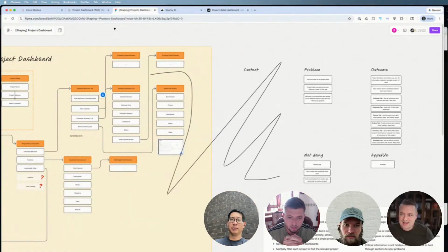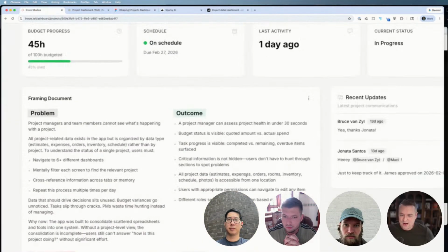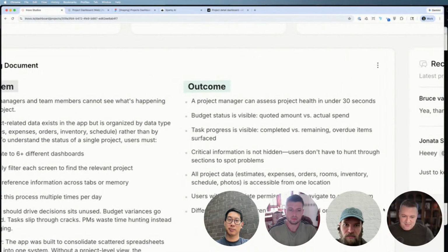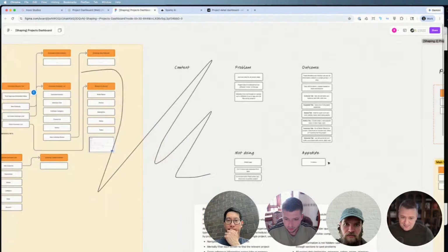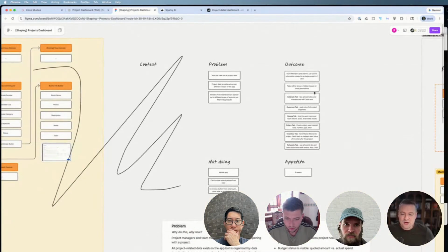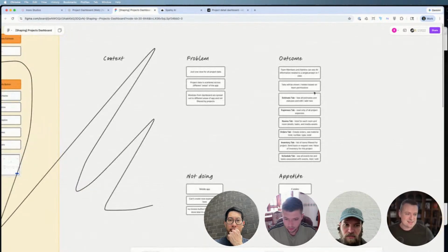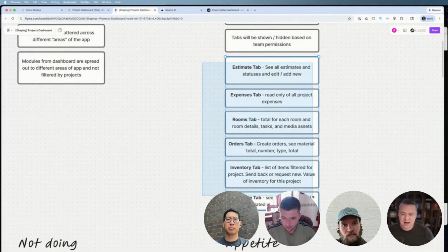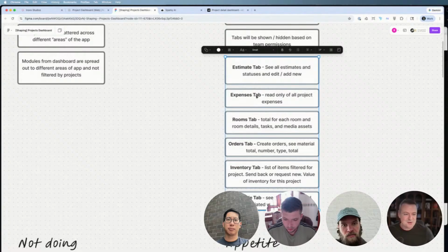And that's scary when you're building out the frame of a project, because we did not use the word tabs anywhere, because the more we got into it, we realized you're going to have something on the third tab on the fourth row down that's pretty important, and you're not going to see it because it's buried 3 clicks away. We just assumed, but it took us 4 or 5 hours of being into just the framing and the shaping to finally pull that piece out of it. You can see here we actually put tabs in our initial frame, and it's just one word, but all of a sudden it creates this little mental model of, no, they asked for tabs, obviously we have to build tabs.